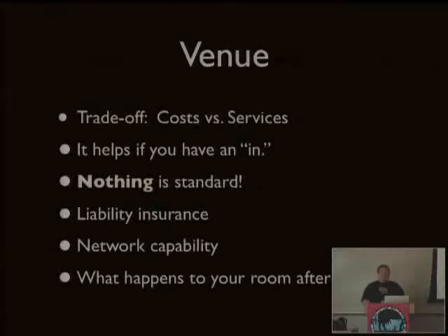And what that means is, if you had any equipment set up in that room, you need to make sure you take it down every single day and come in the following day and put it back up. So when you're dealing with your venues, talk to them about when exactly you are getting the room. And preferably, you want to tell them that you want the room 24 hours a day.